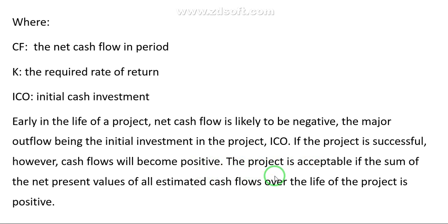The project is acceptable if the sum of the net present value of all the estimated cash flows over the life of the project is positive. As I said before, if the NPV is positive, then the project is successfully done, it means accepted. If the NPV over the project life is negative, then the project is going to be rejected, or it is going to be done unsuccessfully.